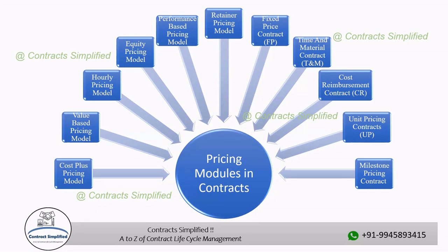Payments. The contract should clearly outline the project scope and objectives and the specific milestones that need to be achieved. Each milestone should be well defined, measurable, and tied to a specific deliverable or achievement. For each milestone, there is an associated payment amount. The payment structure can vary widely depending on the nature of the project and agreement between the parties. Typically, the more complex or critical the milestone, the higher the payment associated with it.